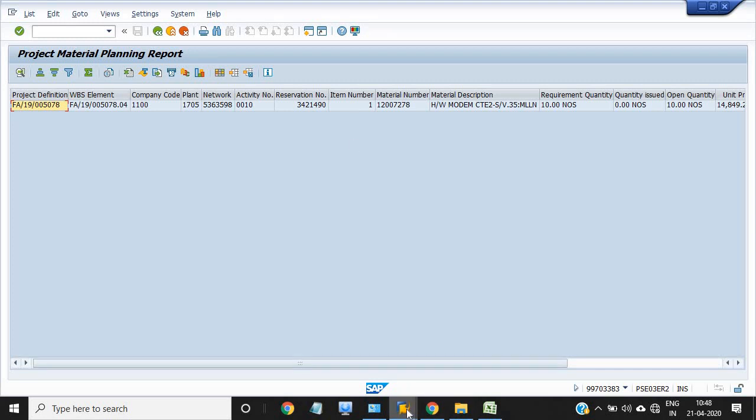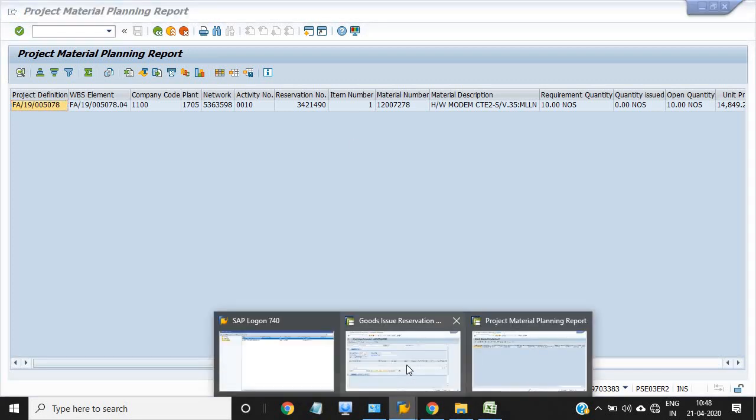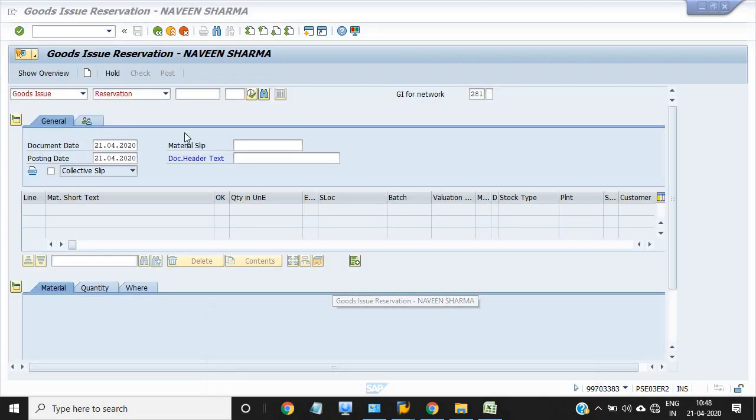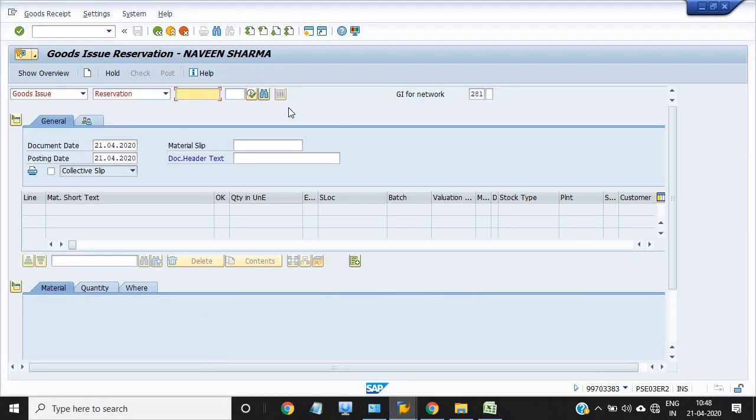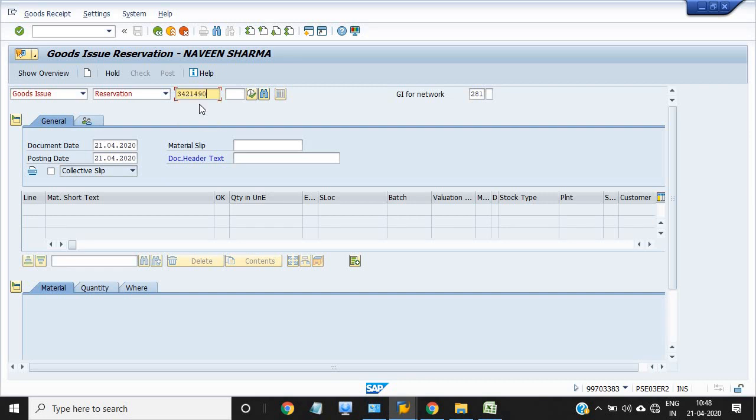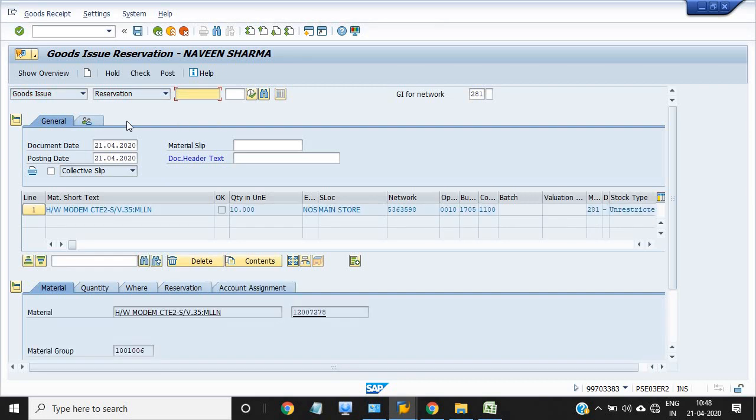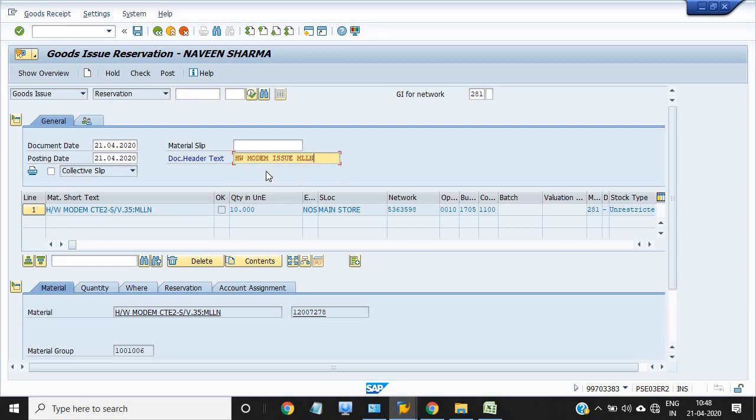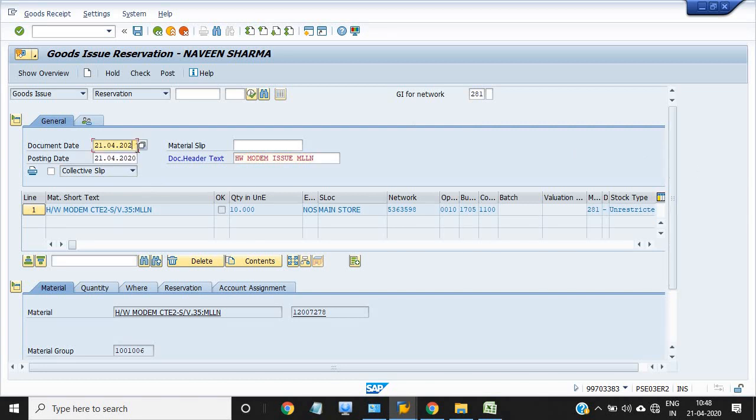This is the reservation number and I just use the 281 movement type goods issue against reservation. You just enter your reservation number and enter. Do not do anything, we just enter the material number.